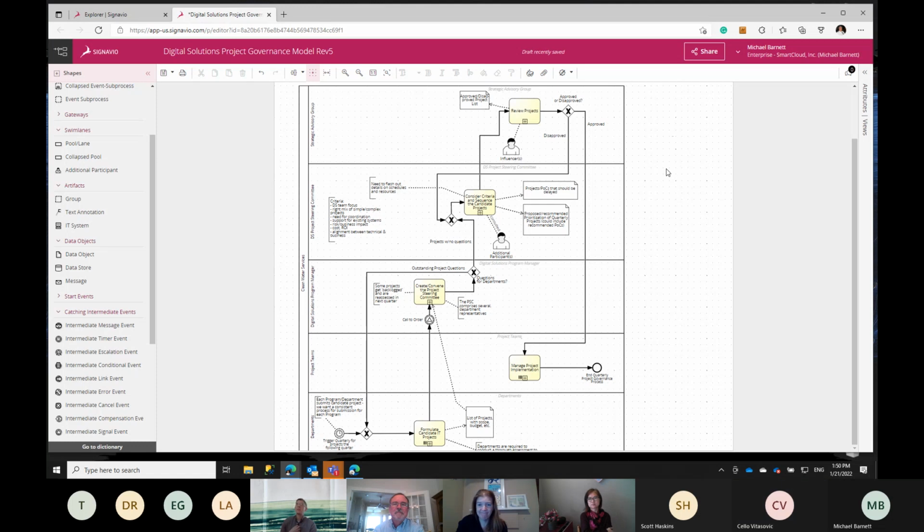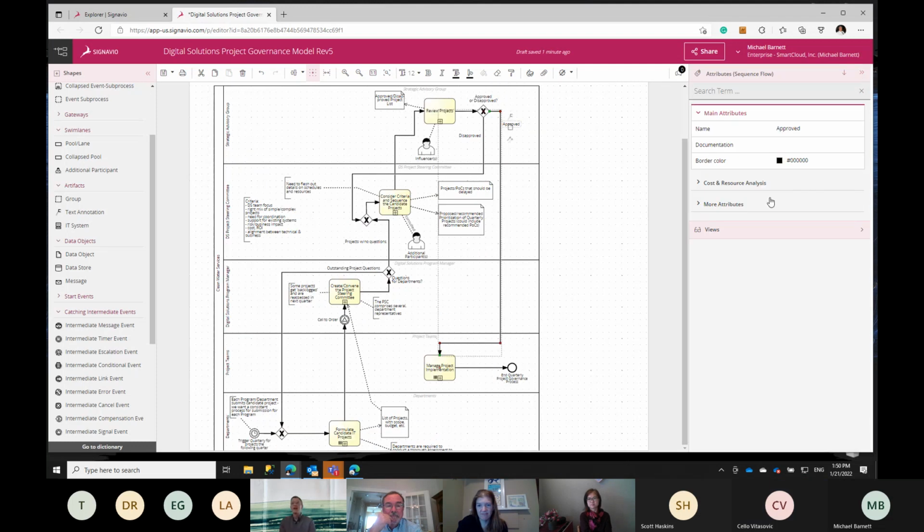And one of the roles I play is I do a lot of limiting. I say, okay, we can do 5 or 6 projects this year, because I've never seen an organization be able to do more than 5 or 6 strategic level projects, period. And so again, it's just building those filters, to Mike's point about how you prioritize. You have to start with a series of filters and say, this is the absolute maximum, and then all the work operates in that context. It's typically not a budgetary limitation, it's a bandwidth limitation.